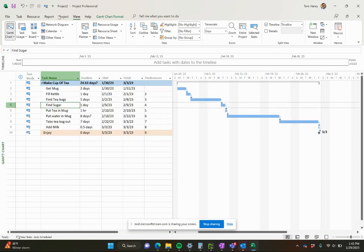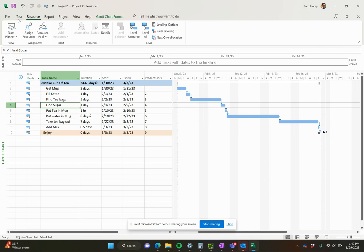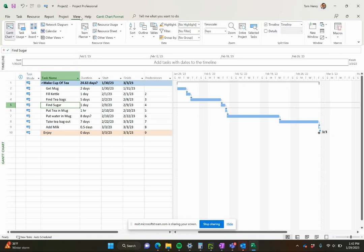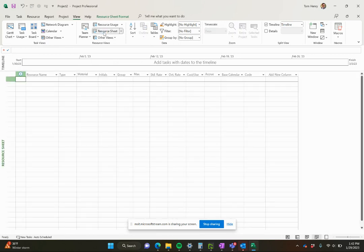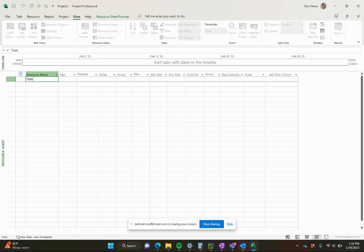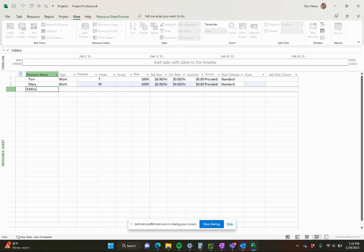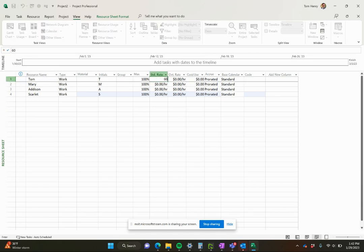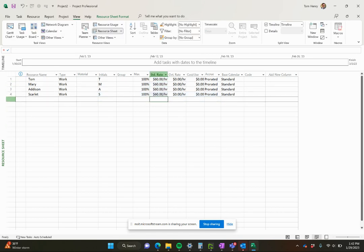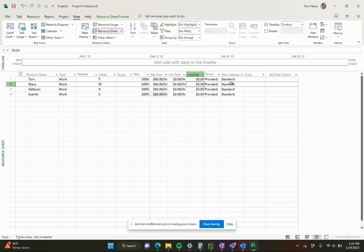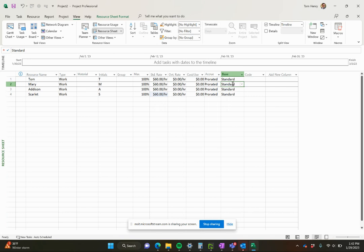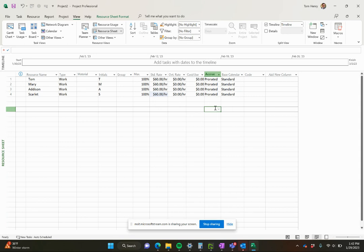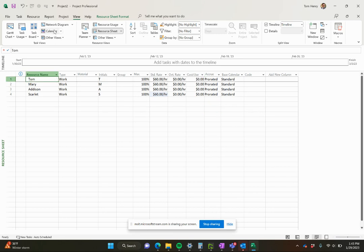Moving on from tasks, we're going to talk about resources now. I'm going to go to the view ribbon and click on the resource sheet view. This is the best place, in my opinion, where we can come and add all of our new resources. I'm going to put Tom, Mary, Addison and Scarlett. These are work resources. I can give them an hourly rate - 60 bucks an hour each person. You can give them overtime rates. You can select a calendar. As I showed you earlier, you can change working time for the calendars. Those can also be assigned to the resources. As you assign a resource its own calendar, or maybe it's a United States worker versus an Indian worker versus a British worker, that resource's calendar will overwrite the calendar for that particular task. It's a hierarchy of calendars: project, task, resource. So the resource will overwrite the task. The task will overwrite the project calendar.